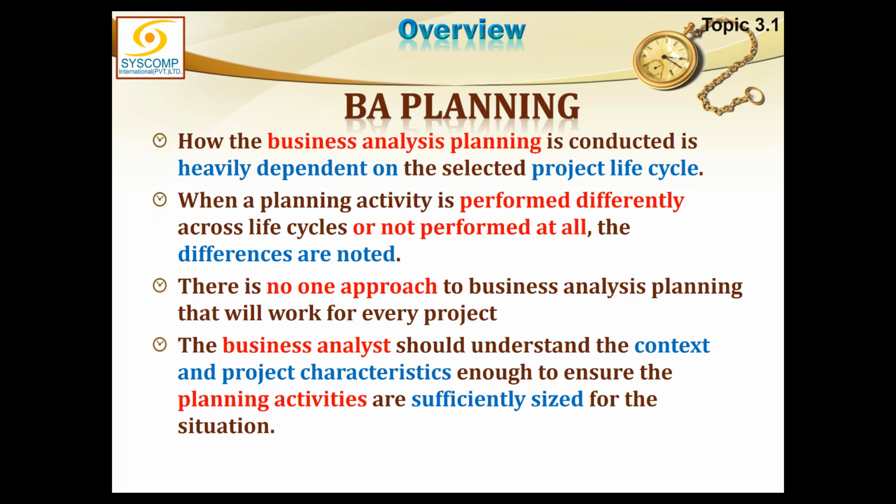Yes, sir. Okay. Let me also define that I said it will depend upon the project, how the work of the project, how the project life cycle is defined. But in most organizations, project life cycles are pretty much standard. For example, there is a web development company, a software house, and they only do one kind of job, and that is they develop dynamic websites. Naturally, whatever project they do, they will have a life cycle predefined. First we will collect data from the customer and put it into a requirement document, then we'll do this, then we'll do this. So they have divided their project into standard 4 or 5 phases.